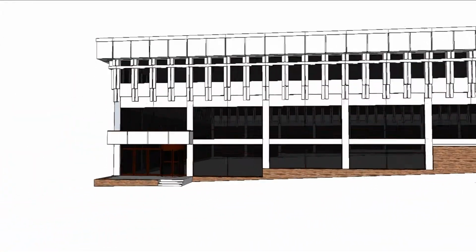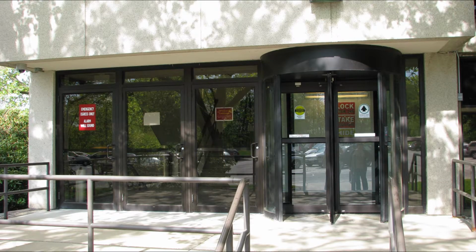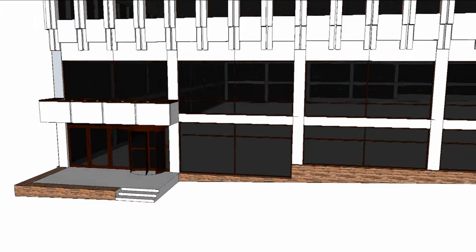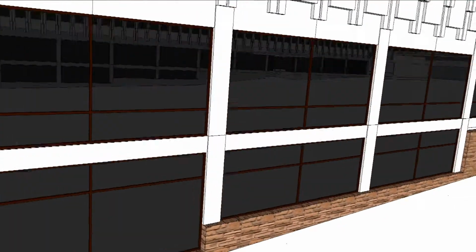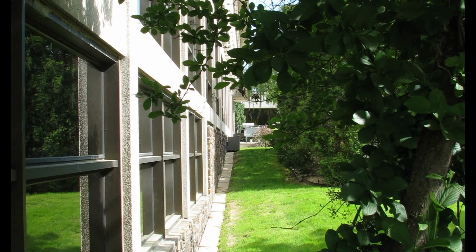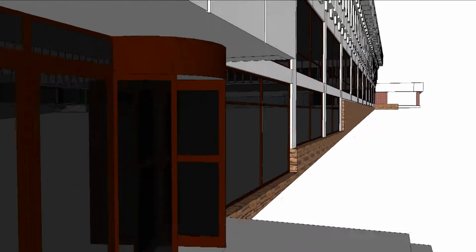By now he has a good feel for the age of the sealant around the building and the condition of the surfaces. A careful and thorough examination is needed because this survey and the report from it will serve as the basis for the scope of work.